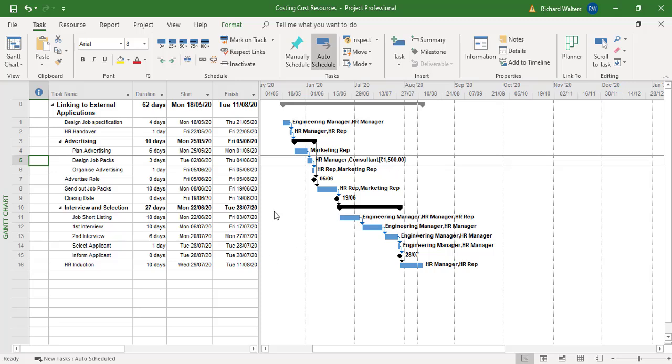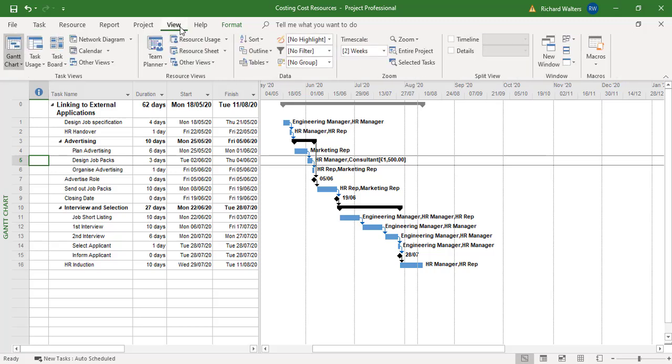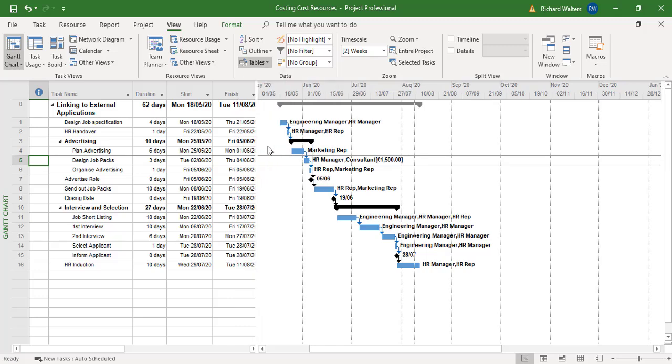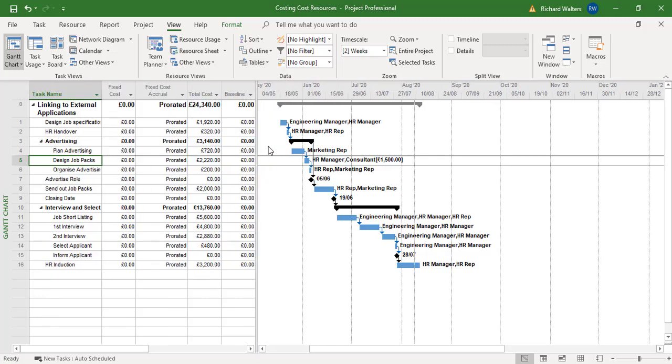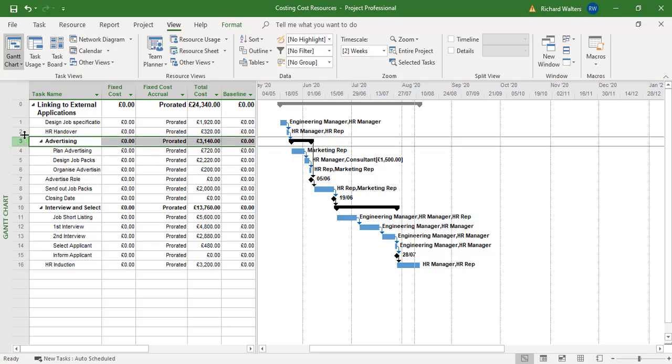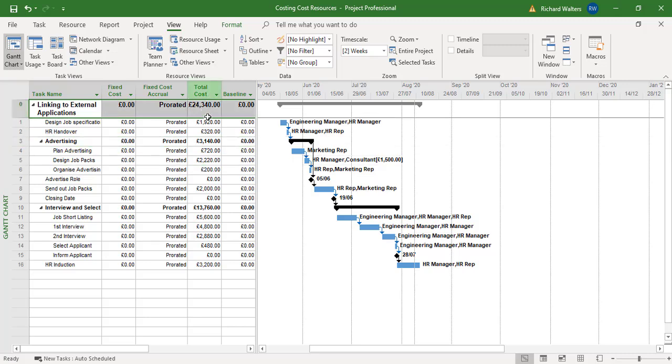But if I go back to the table view now for cost table, I can now clearly see that the design job pack has increased hugely from the 720 and the advertising has changed and that would have also affected the total cost.